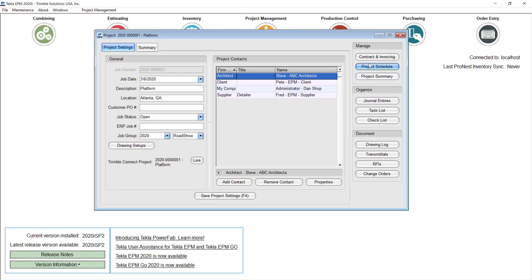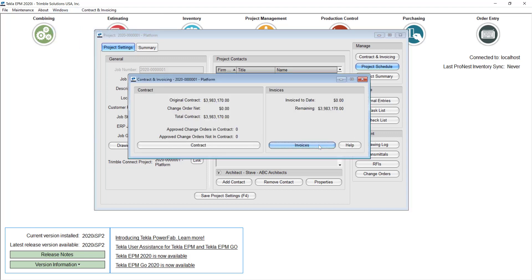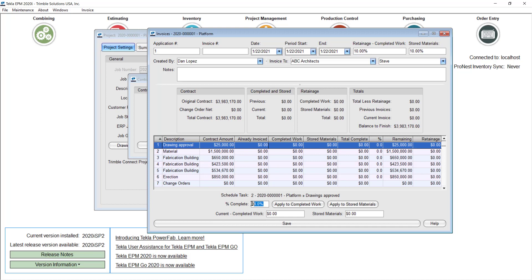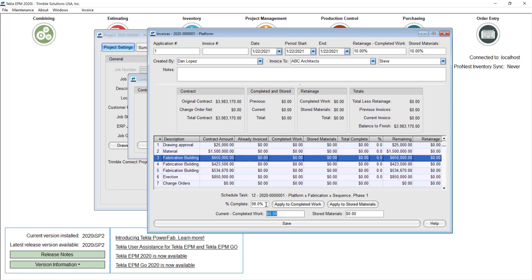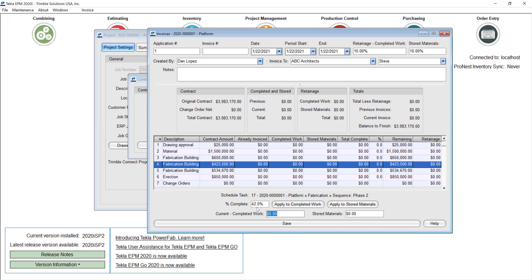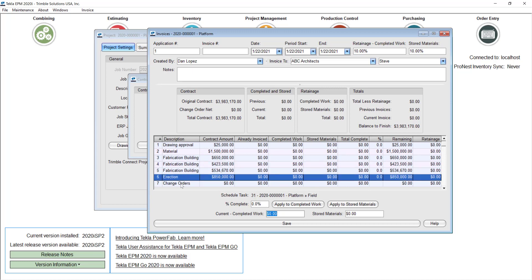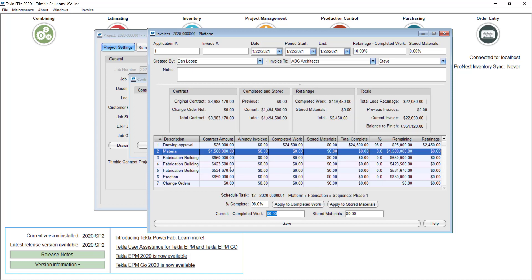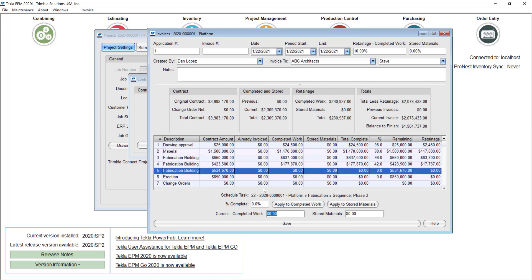I'll close my Gantt chart and go back to the contract and invoicing screen, go to invoices, and click new. This time it's suggesting the actual percentage it's reading from the Gantt chart — drawings approved 98%, material as well, and fabrication building is also 98% done. This one is 42, nothing has been done here, and pretty much nothing erected. Based on those percentages I can create my AIA G702 and G703. I'll apply all the costs to those percentages, go through each one, and save.